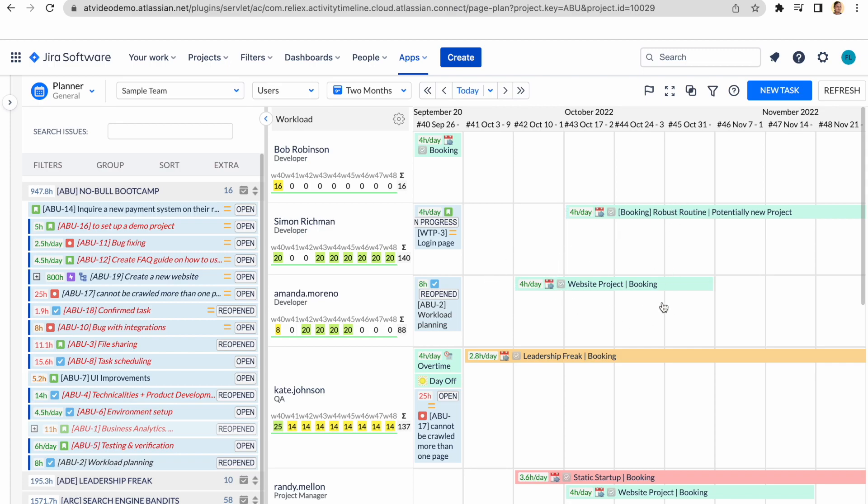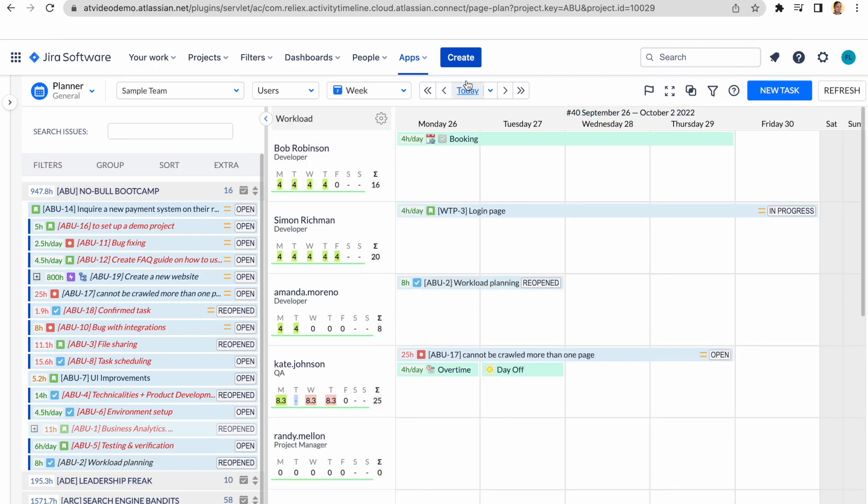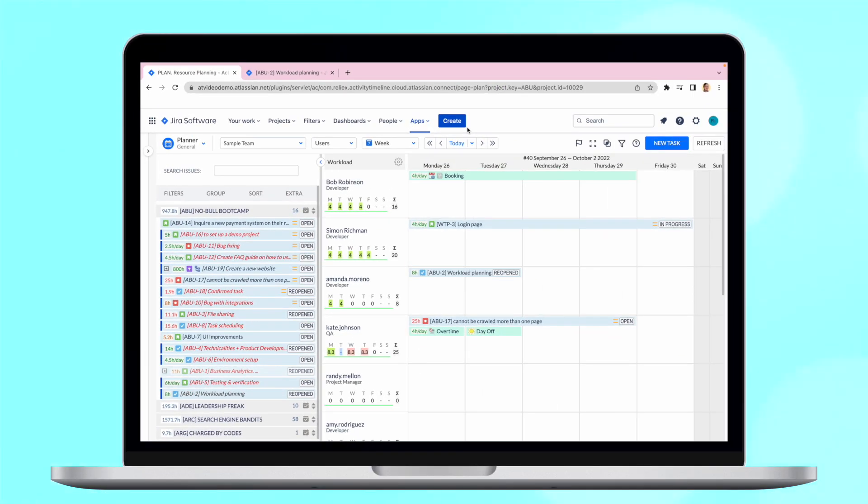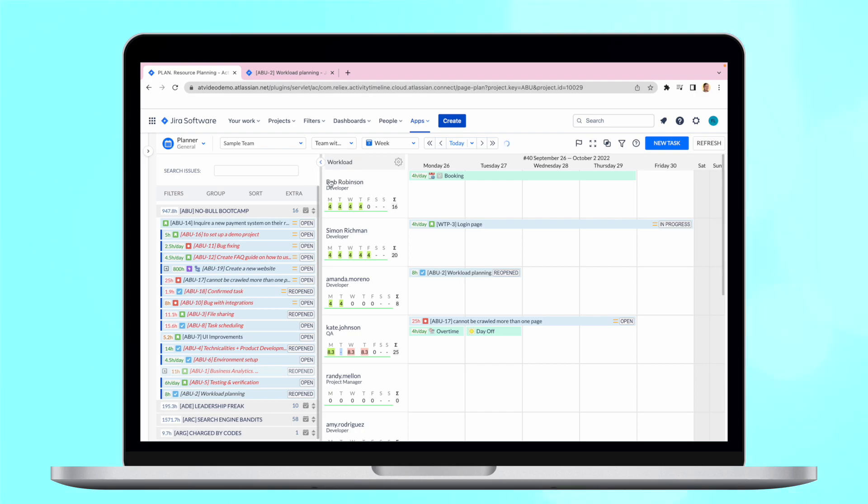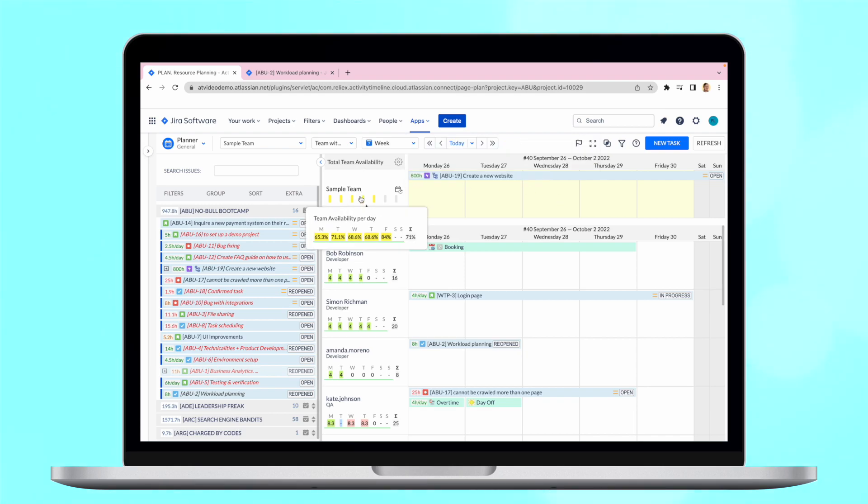Now, when we have figured out how the schedule and workload works for individuals, it would also be useful to understand what is your team's capacity. For this, you can use our team panel that aggregates data from all users inside the team. To enable a team timeline, simply switch to team with users on the top of the screen. This panel allows you to see workload and availability in hours, days or percentages, so you can forecast if your team can do some new projects.